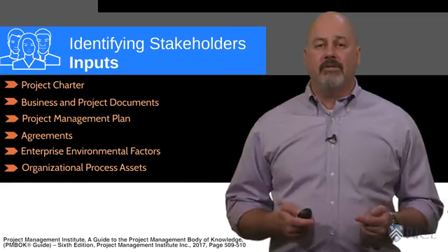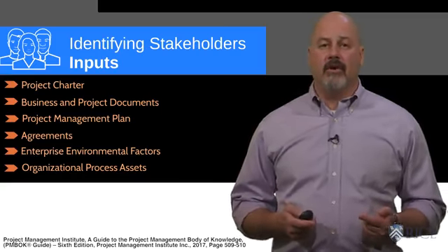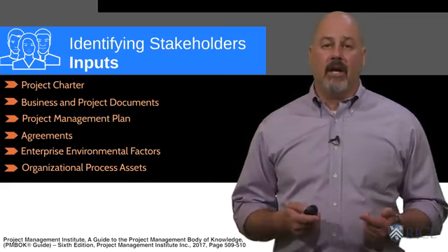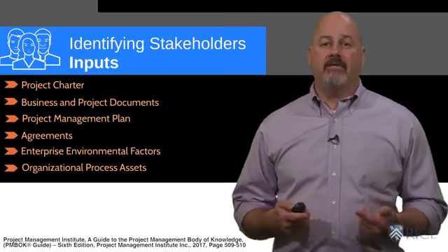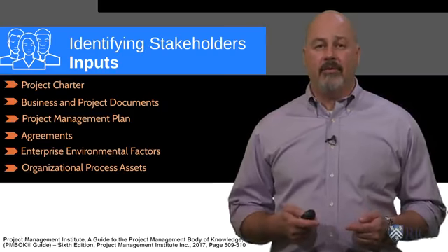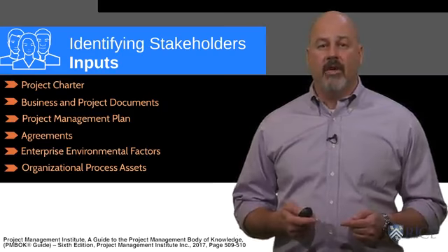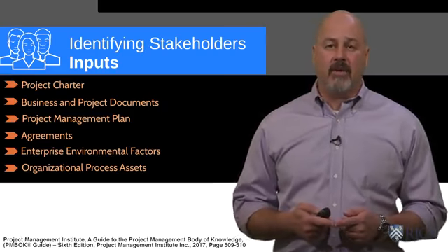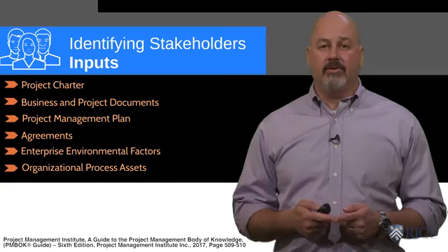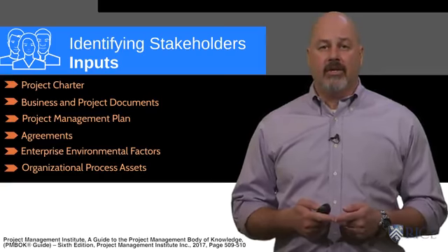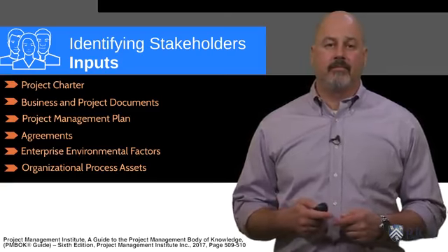Talk to people in your organization who have worked on similar projects or have experience working with outside groups that may be affected. And if you have it available, you can go to your project management office, who may be able to provide examples of previous projects and how they identified their stakeholders. Look for lessons learned so that you don't have to reinvent the wheel.